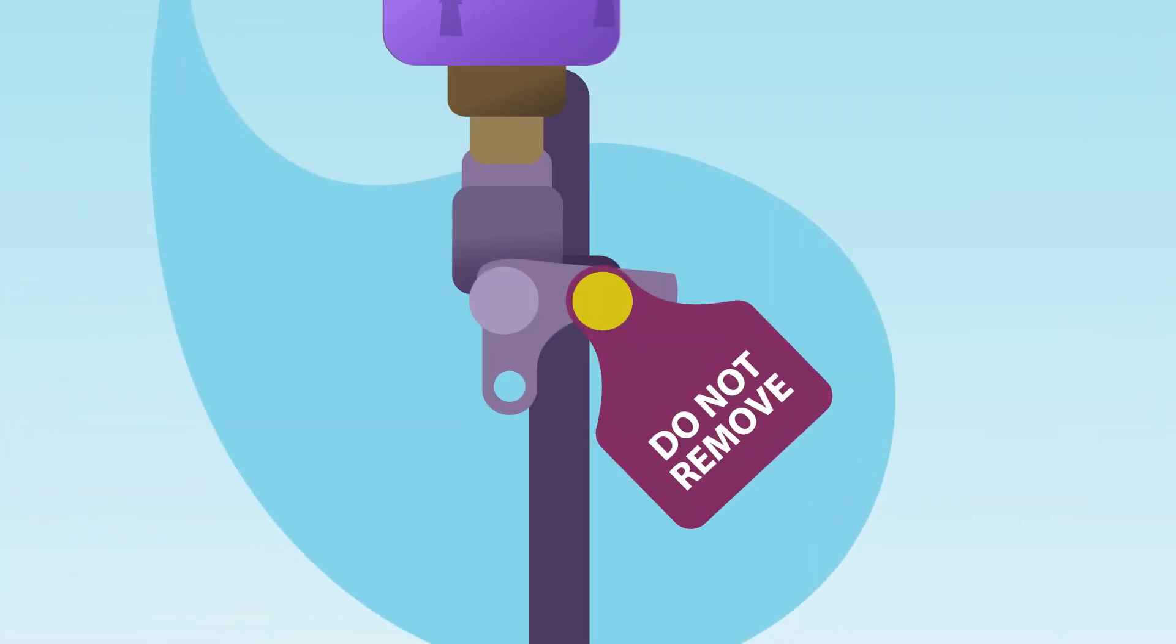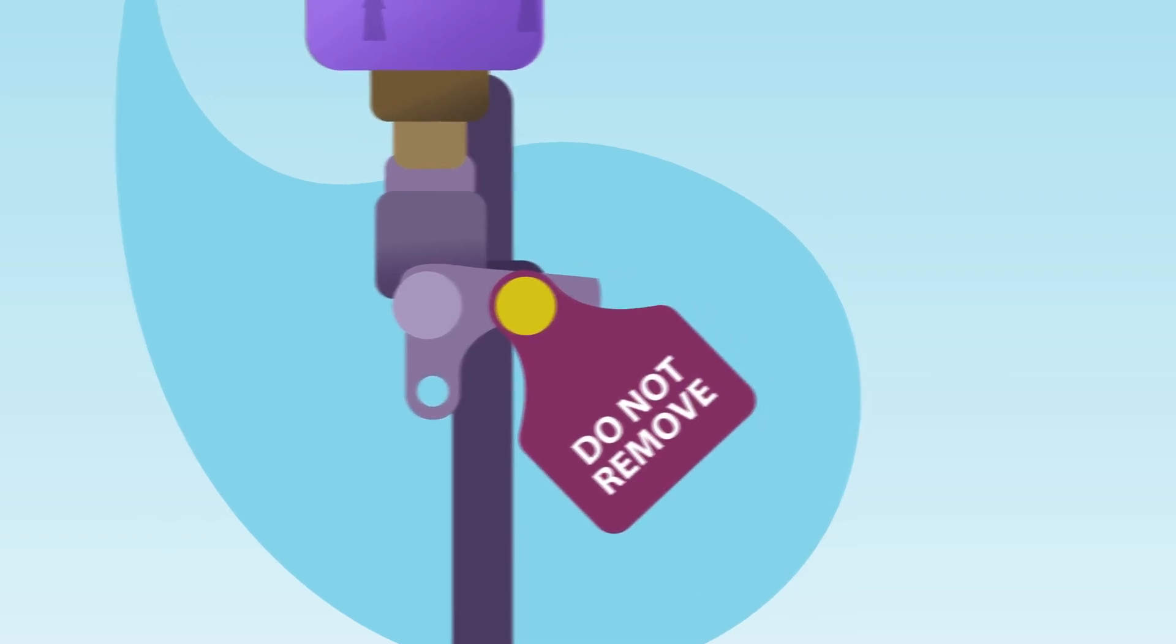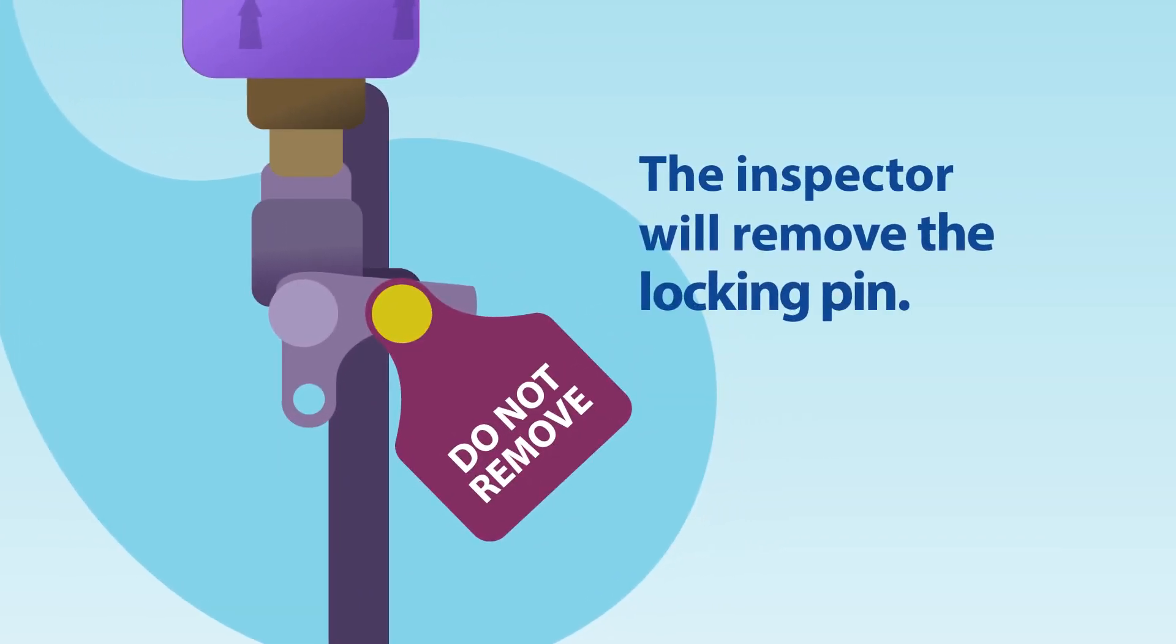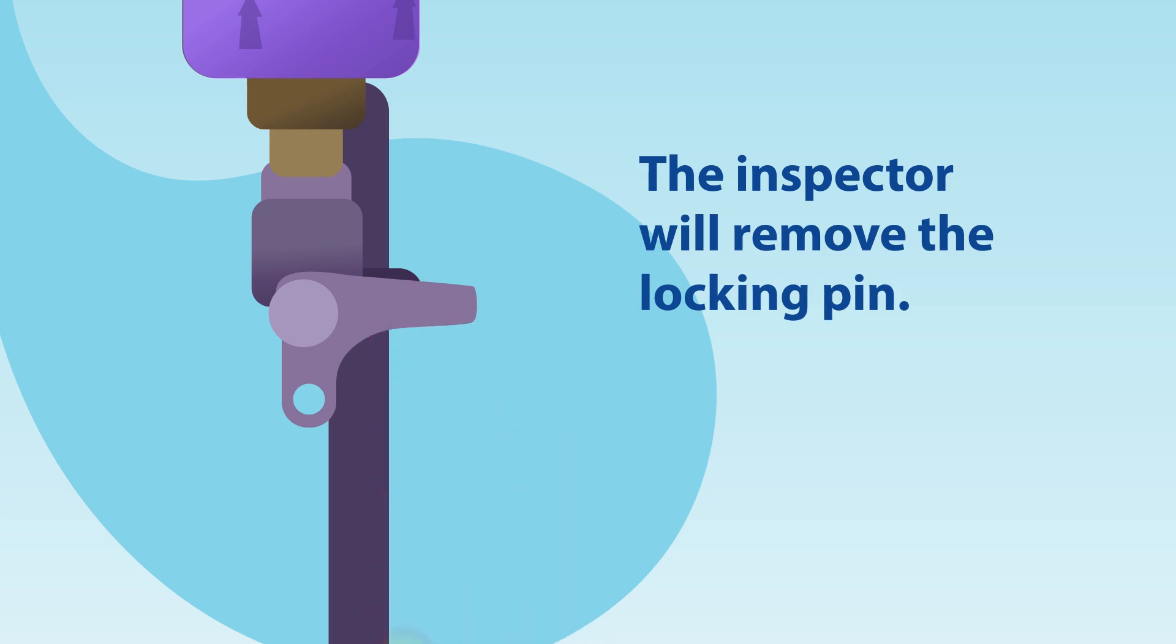The current yellow locking pin will stay in the off position until the commissioning inspection, after which the inspector will remove the locking pin and tag.